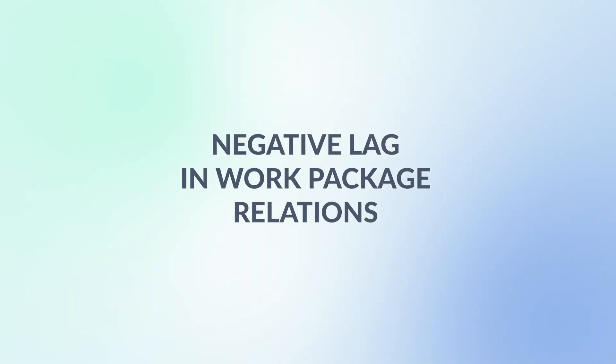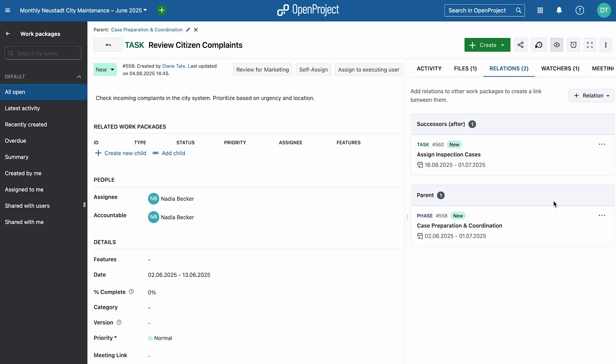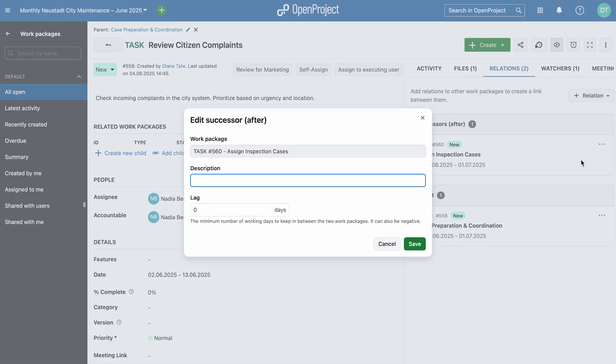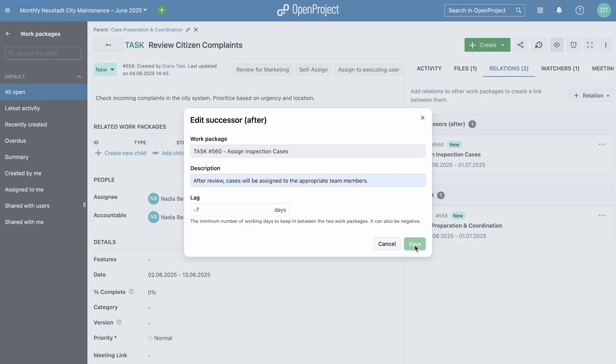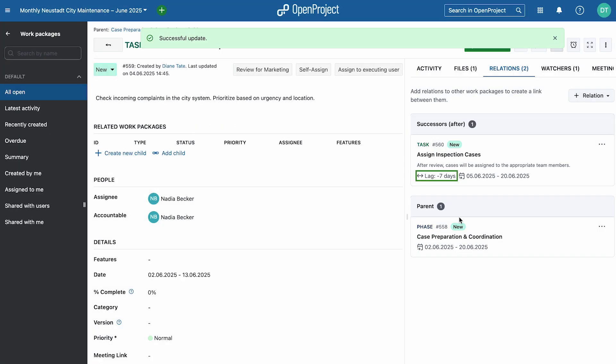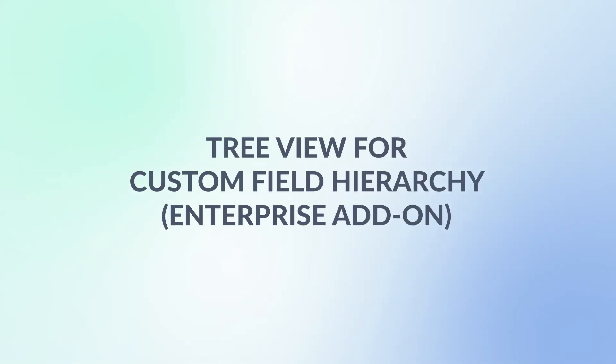And here's another one for better planning and scheduling: negative lag. You can now specify that a work package starts before another one finishes. This adds more flexibility to scheduling and lets you model real-world project dependencies more accurately.